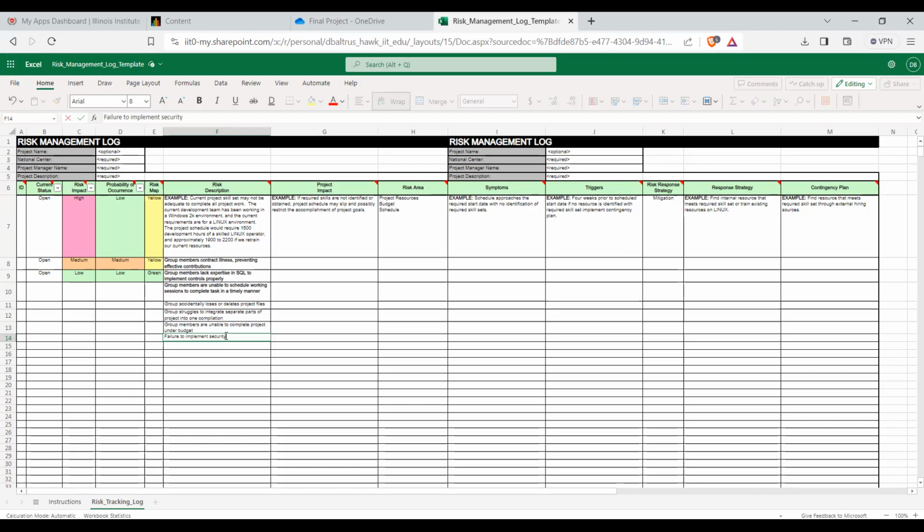Well, I feel like if you can't implement the security control, doesn't that cover lack of expertise to implement controls? Well, whoever's going to implement them, you will need somebody to test, right? Generally, you do a test internally, and then a third party will come and actually test. You could have something working, and you can give the third party the test plan and the controls, but they may have their own way to test the control and they may fail you. So it could be failing your controls.